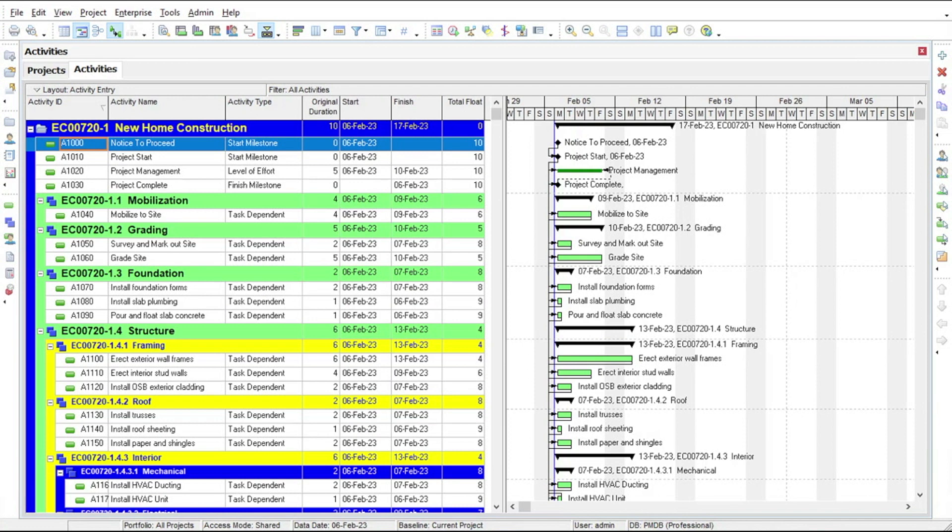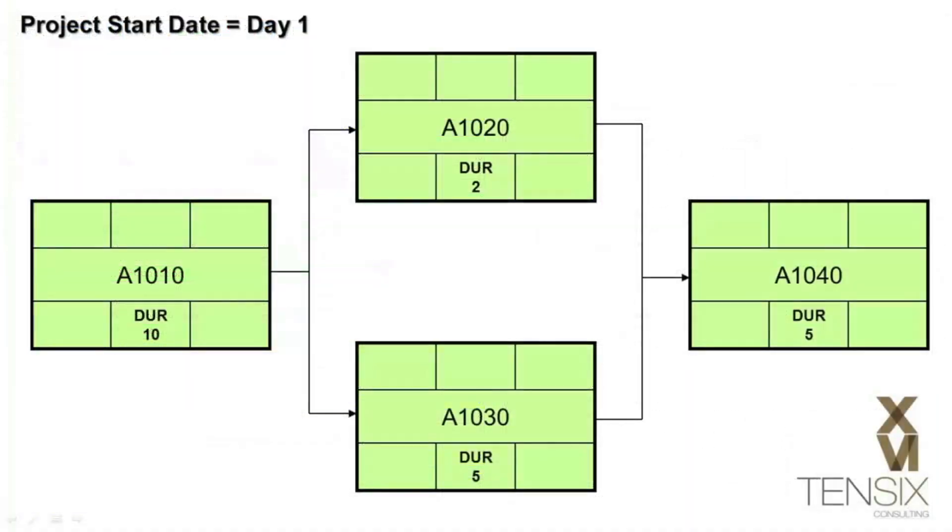Before we do that, however, let's take a look at a simple critical path model and learn how P6 calculates the dates for the project schedule. In this model, you see four nodes that represent activities in a simple network. At this point, there are no dates, just durations and relationships, much like our new home construction project.